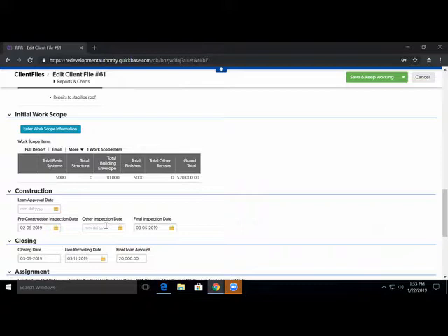For us to put in, Jane, and again, I may have missed it. No, the contractor information is not in there, but as part of the loan application package, not the pre-qualification package, there should be a contractor or some sort of a contract or agreement with the contractor showing that the budget for the project aligns with the pre-qualification amount for the loan. Okay, so that's where the contractor's name would be recorded with the bank.